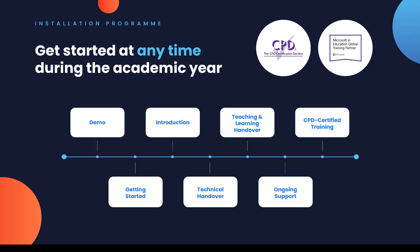When we get started we invite you into a planning team — that might be your technical lead but also a lead from teaching and learning, because we see this very much as a teaching-and-learning-led project. After the introduction and prerequisites are completed, we build the solution and hand it over for testing and snagging, then do a final technical handover to the technical team and a separate teaching and learning handover covering educational frameworks. After that we have ongoing support throughout the year.